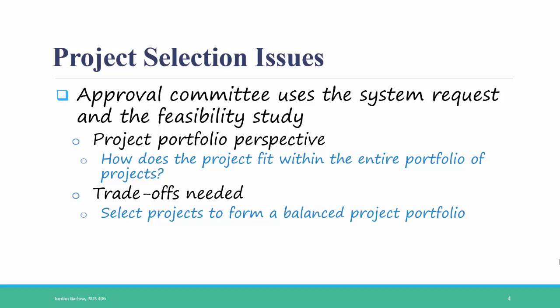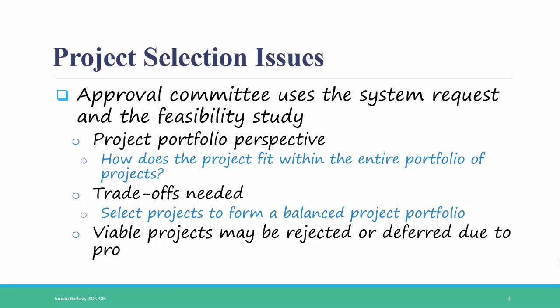For example, organizations will want to have a balance of large and small projects, expensive and less expensive projects, high-risk and low-risk projects, and so forth. If a lot of high-risk projects are currently being undertaken, a new proposal for a high-risk project will likely be deferred or rejected. The same could go for any of the characteristics listed. Any viable project might be rejected or deferred due to project portfolio issues.